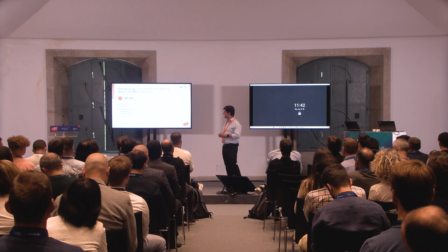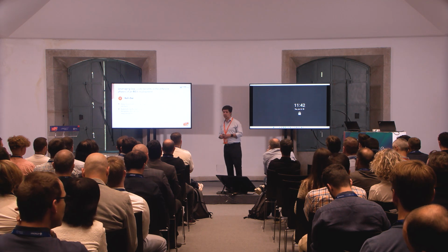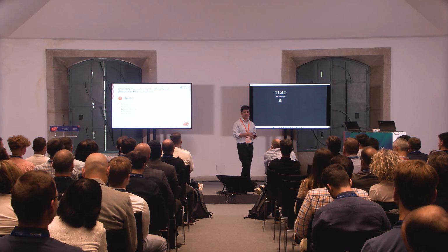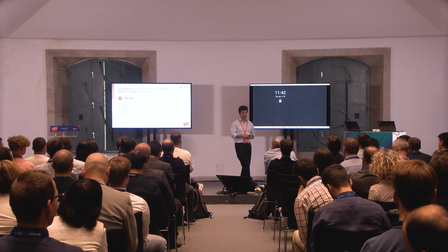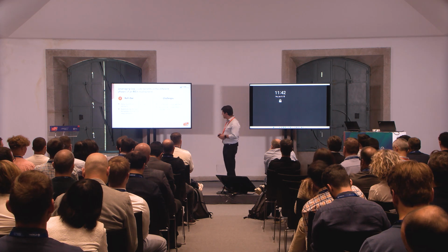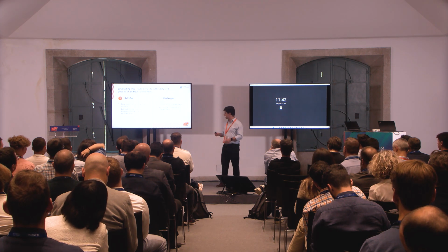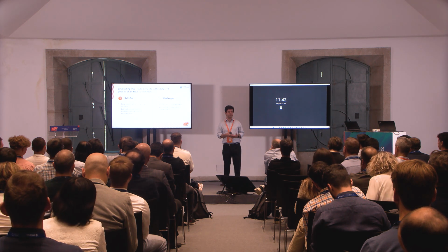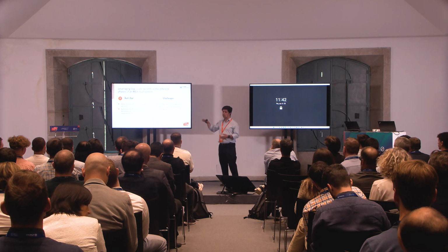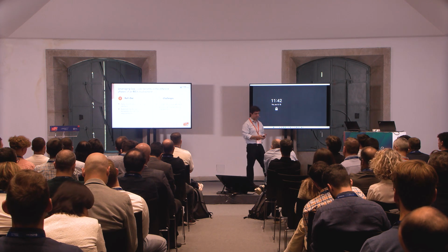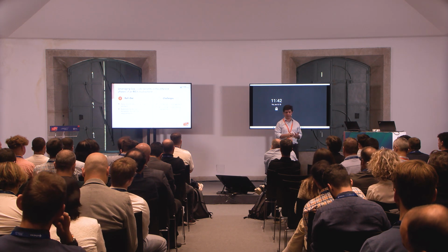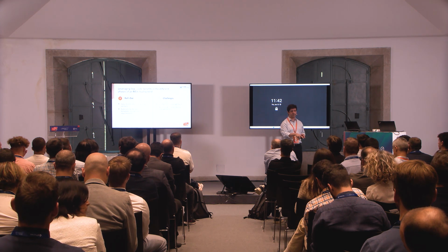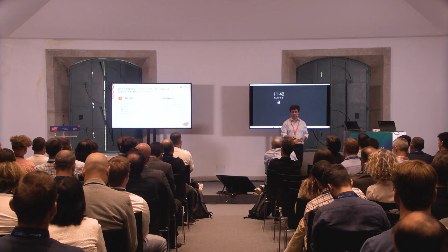So low-code can help you here, because it can allow you to quickly and easily modify what you are delivering as part of the template to adapt to the needs of the individual sites. Again, this doesn't come for free, because if you are doing this, you are compromising the concept of a baseline. So proper configuration management is essential. So you need to version these things. You need to ensure that you manage the dependency. So whatever you changed from your baseline template, this will be compatible with that template version. If you do something different, then this won't work.